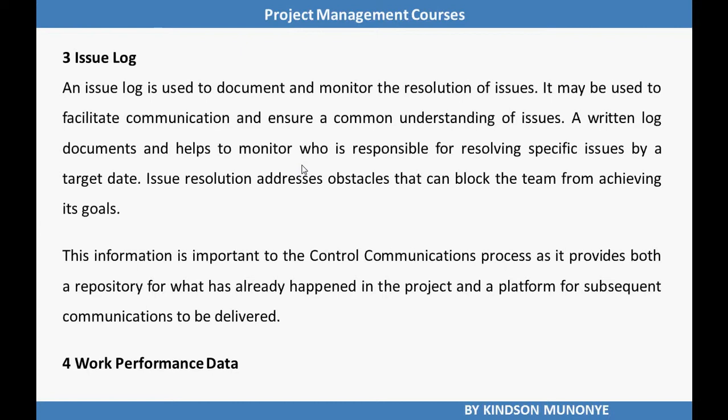An issue log is used to document and monitor the resolution of issues. It may be used to facilitate communication and ensure a common understanding of issues. A written log documents and helps to monitor who is responsible for resolving specific issues by a target date. Issue resolution addresses obstacles that can block the team from achieving its goals. So you see how important issue log is?